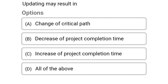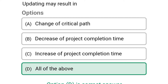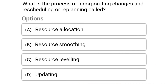Next question: updating may result in — option A: changes of critical path, option B: decrease of project completion time, option C: increase of project completion time, option D: all of the above. The correct answer is option D: all of the above.